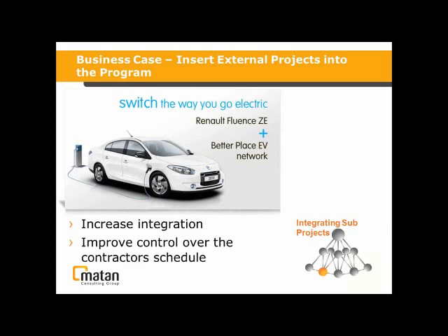But he also requests that once every 2 weeks each one of the subcontractors send him a file with the updated information. So we have a process in place where once every 2 weeks the PO, the project officer, takes all of these projects, loads them back into the project server, and then within one click the program manager gets a picture of everything that has changed within the project files.